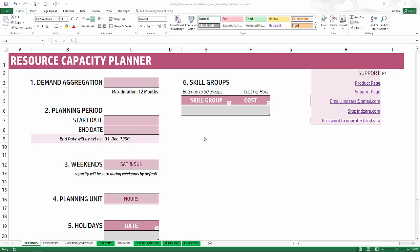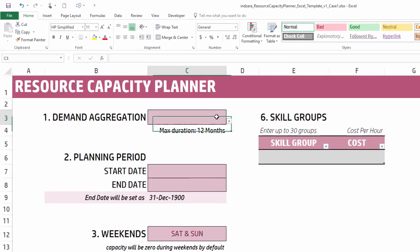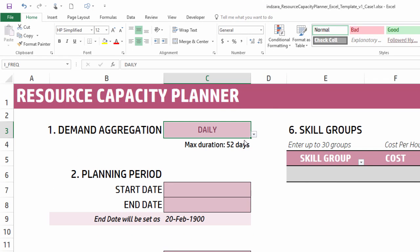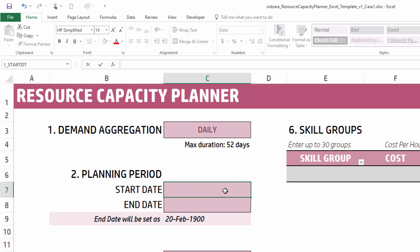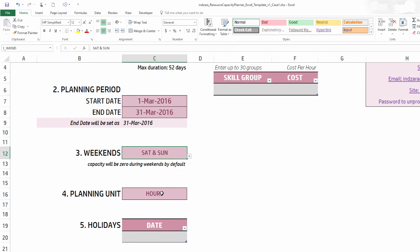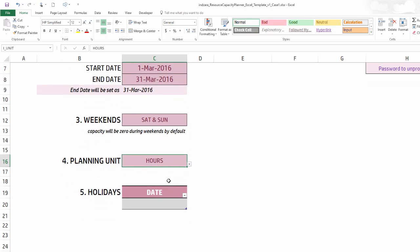This is our resource capacity planner Excel template. First, we're going to choose the demand aggregation level to be daily because we are planning for the entire month of March. I'm going to set the start date to March 1st and the end date to March 31st, leaving weekends as Saturday and Sunday. The planning unit will be left in hours, as we're interested in calculating team capacity in number of hours of work.